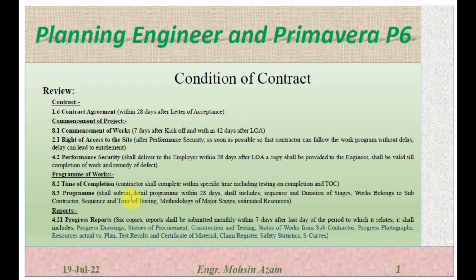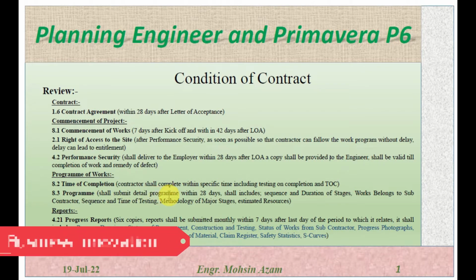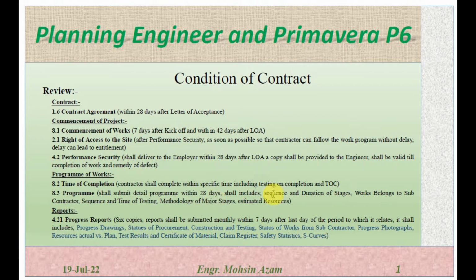Program 8.3. A detailed program shall be submitted within 28 days. Once the kickoff meeting is done, within 28 days the contractor should submit the program. It should include the sequence of work, duration of the stages, work belonging to the subcontractor, sequence and time of the testing, methodology of the major stages, and estimated resources.